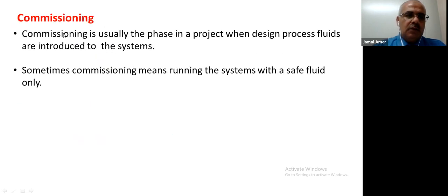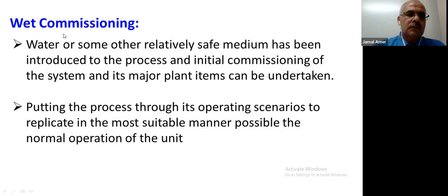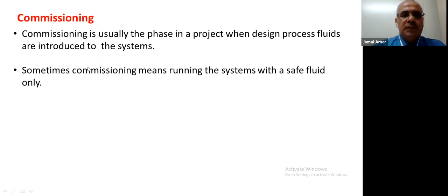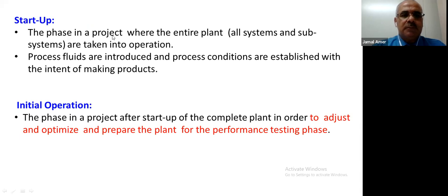Commissioning is usually the phase of the project when the design process fluid is introduced to the system. Some terminology calls this hot commissioning, where we introduce the design process fluid to the system. Startup, what does it mean? Startup is the point in the project where the entire plant is completed and taken to operation. Process fluid is introduced and process conditions are established with the intent of making product.